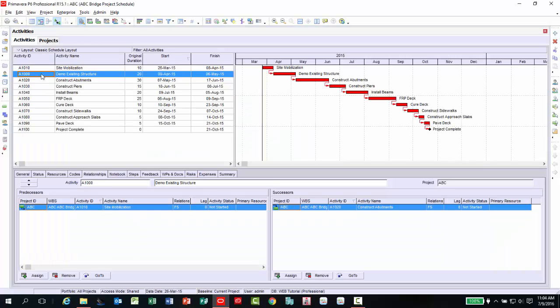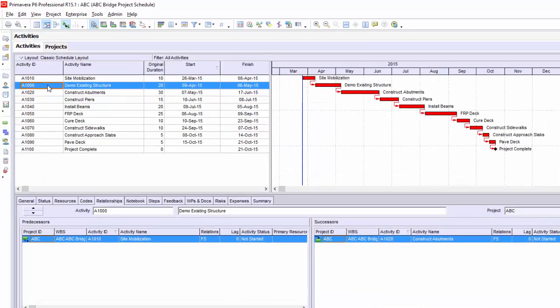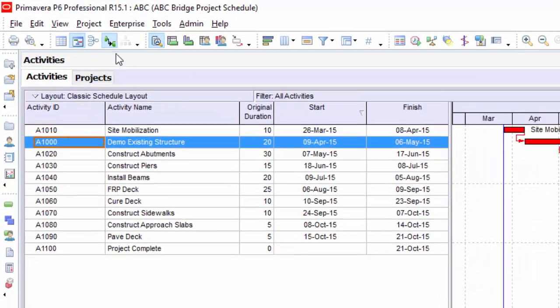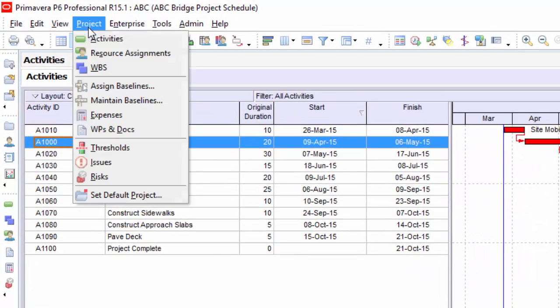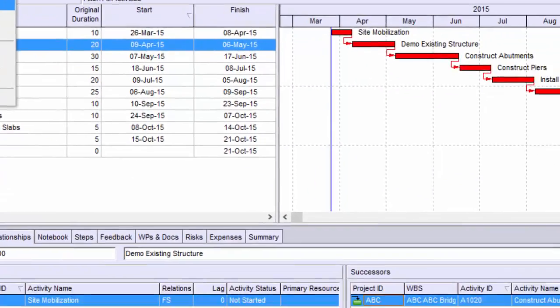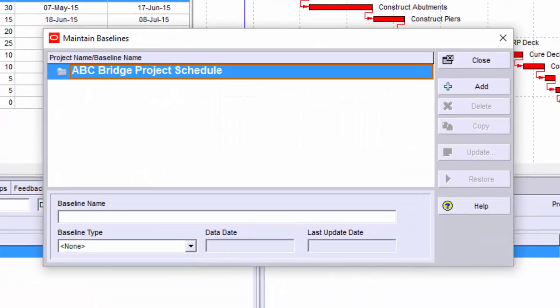Now under the project menu, select Maintain Baseline. From here, you can add, delete, copy, update, or restore baselines for the open project.